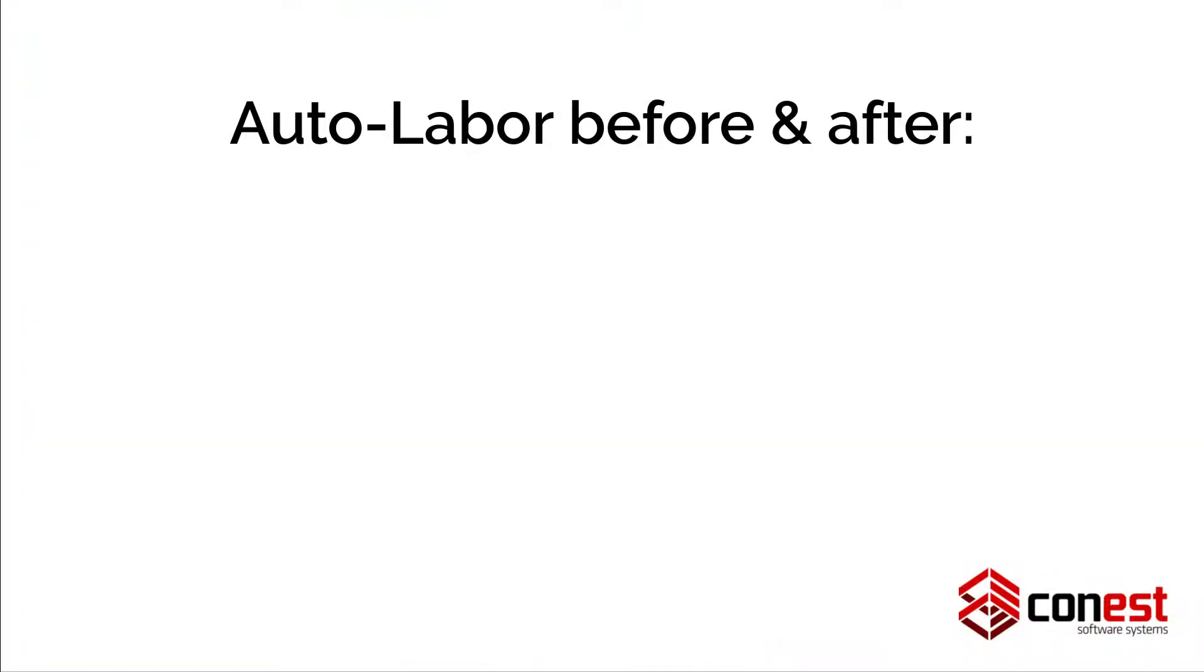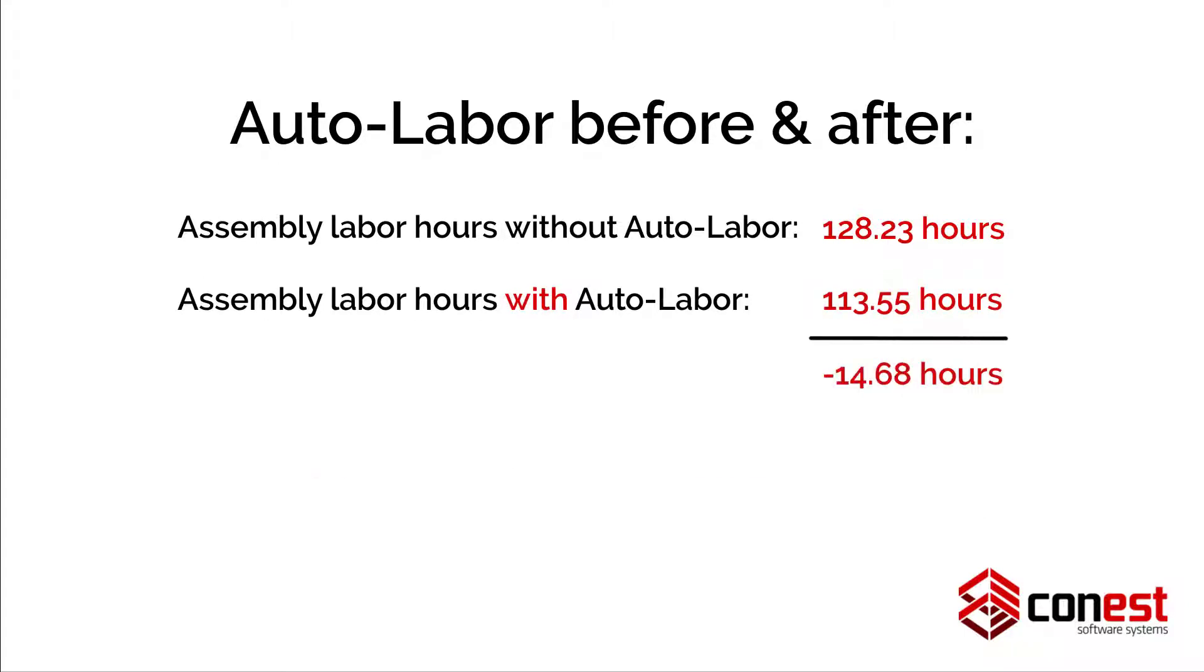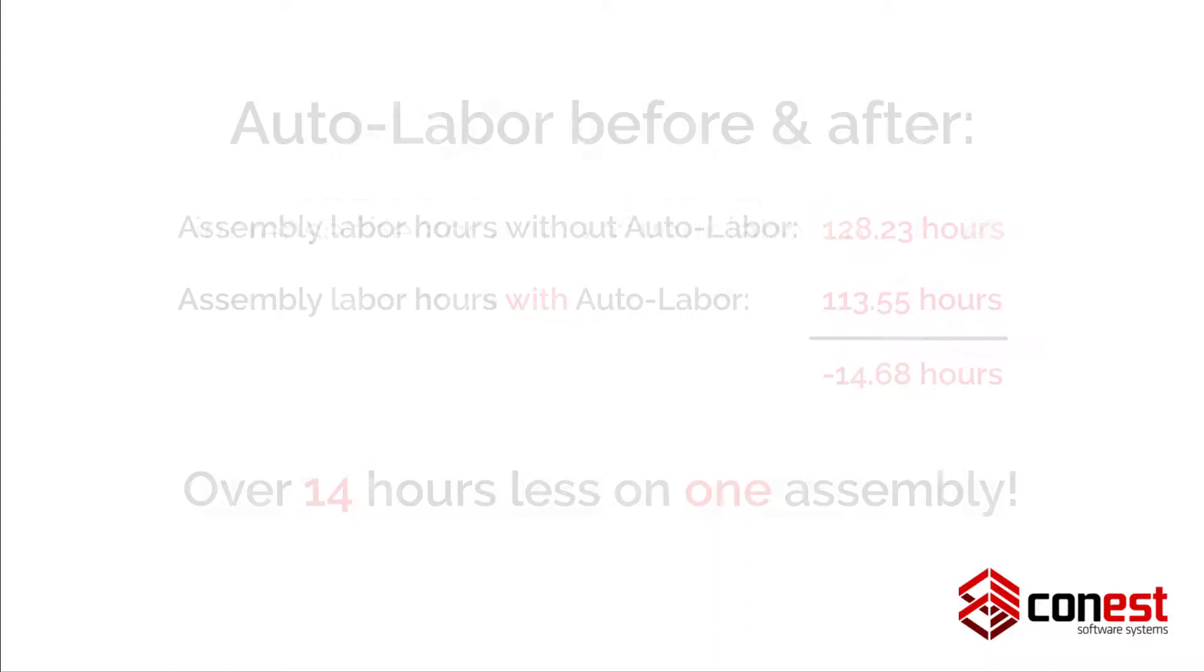Often, the adjusted labor is less than the default labor factor for an item assembly, giving you the opportunity to safely bring in your bid below your competitors.